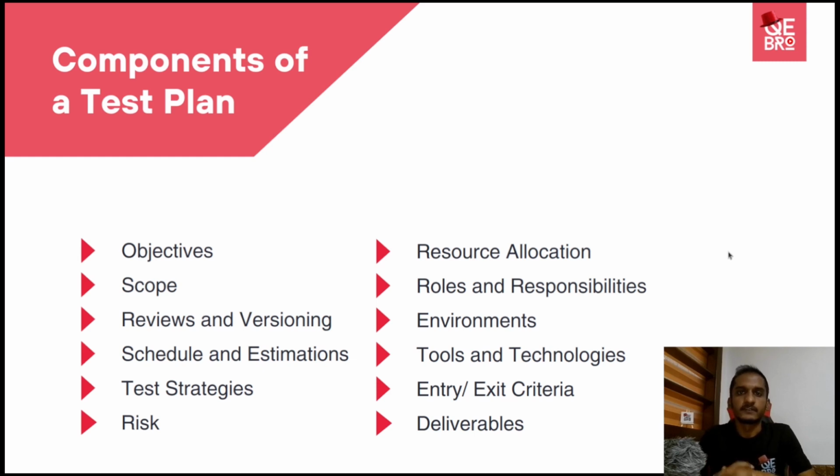Then in the test plan you need to clearly mention the schedule and high level estimations as well, because as I mentioned, project managers will use this for resource utilization too. So if you have the schedules and the tasks and high level estimations here, that's okay, because at this stage it might not be clear how much effort you need to put in man hours, but you can make rough estimations based on your previous experience or the experience of other engineers. Based on those you can create a proper schedule. And also the task breakdown, you can create at this level.